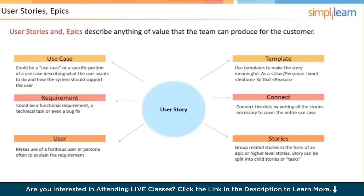User stories are functions or features that the product owner wants developed. A user story turns into working software that provides value to the customer. The product owner is the customer voice and accepts or rejects completed user stories. In the sprint planning meeting - which has two parts - the first part is selecting user stories to be included in the sprint, and the second part is disaggregating each of those user stories into tasks. Those tasks are then actually done when the work of the sprint begins.